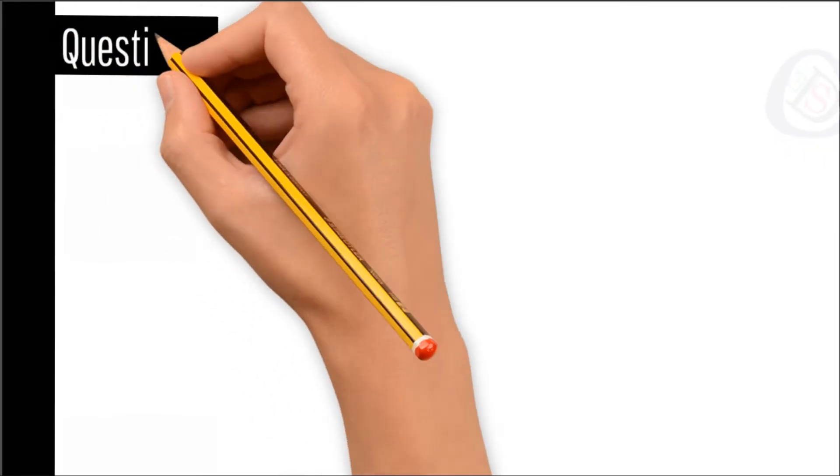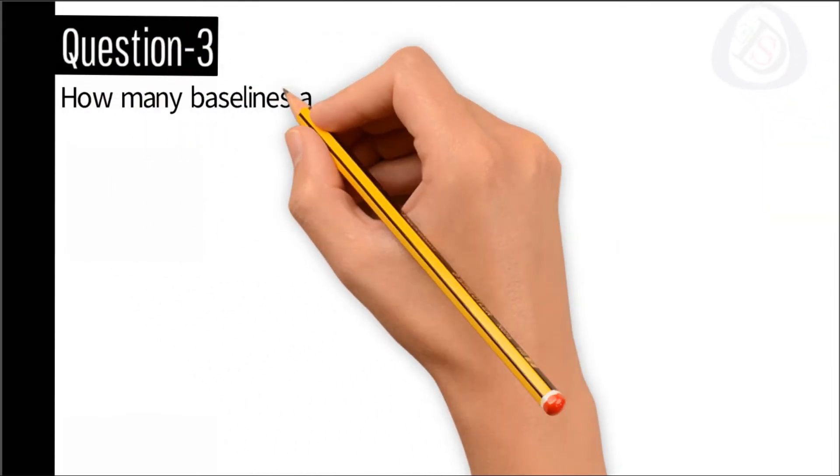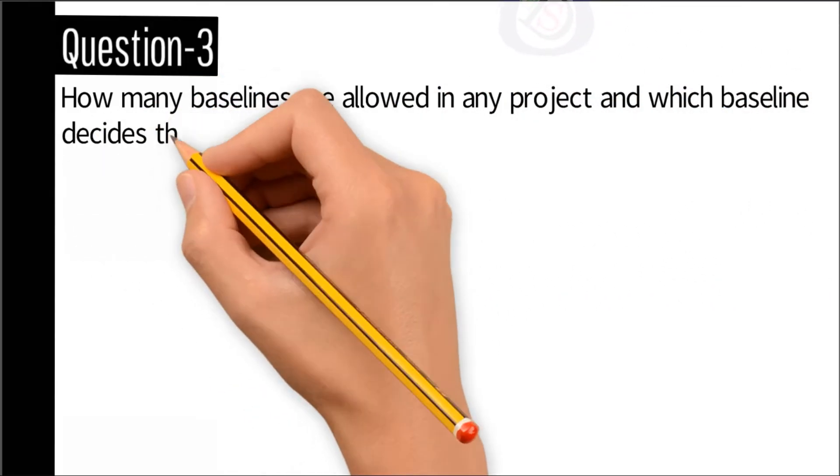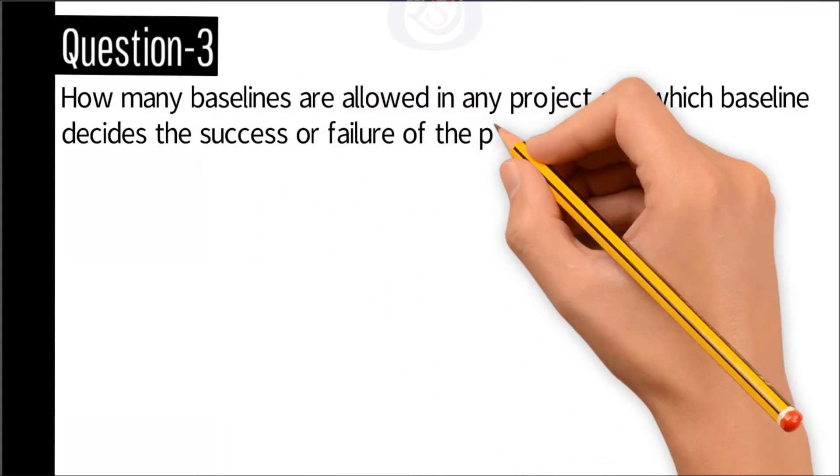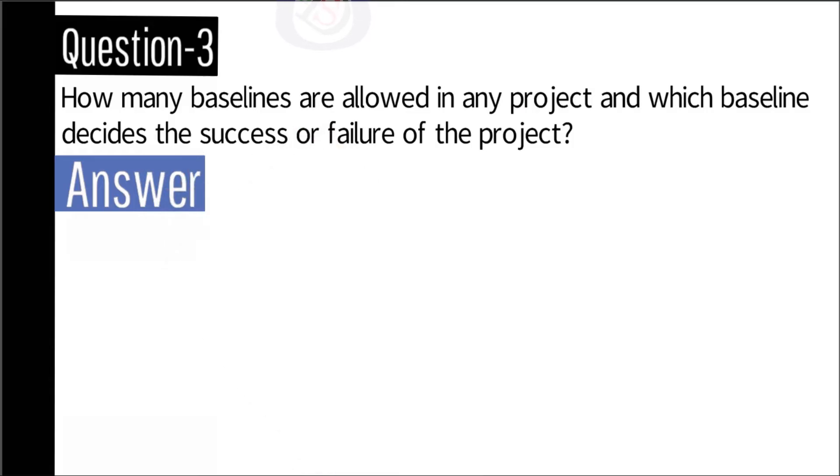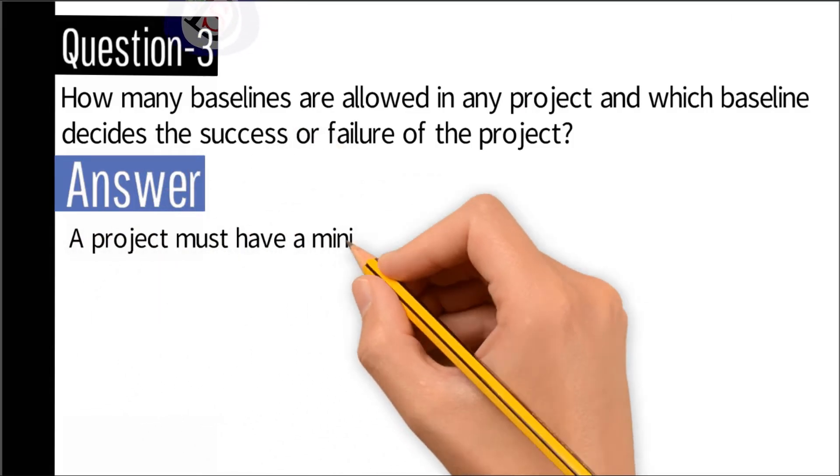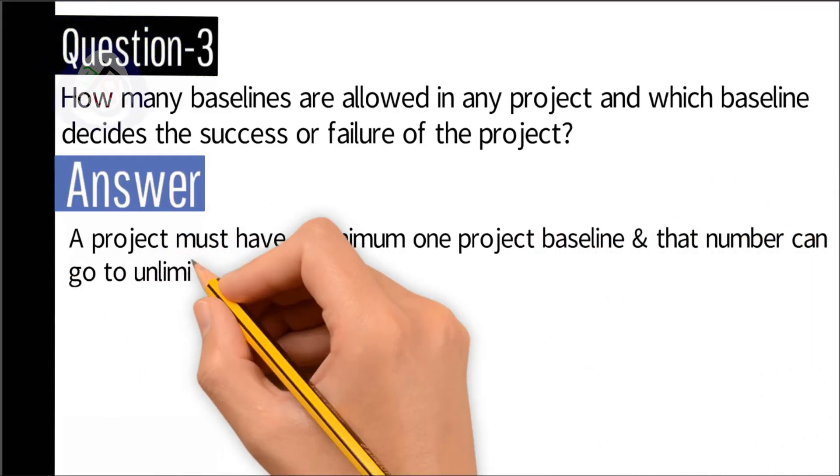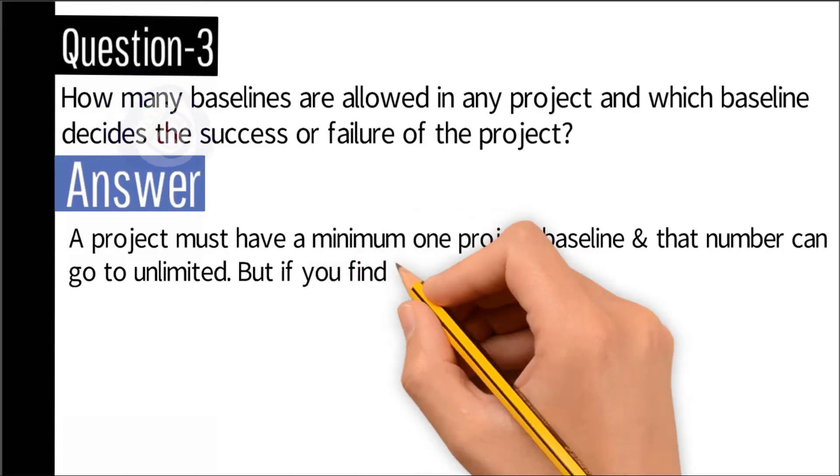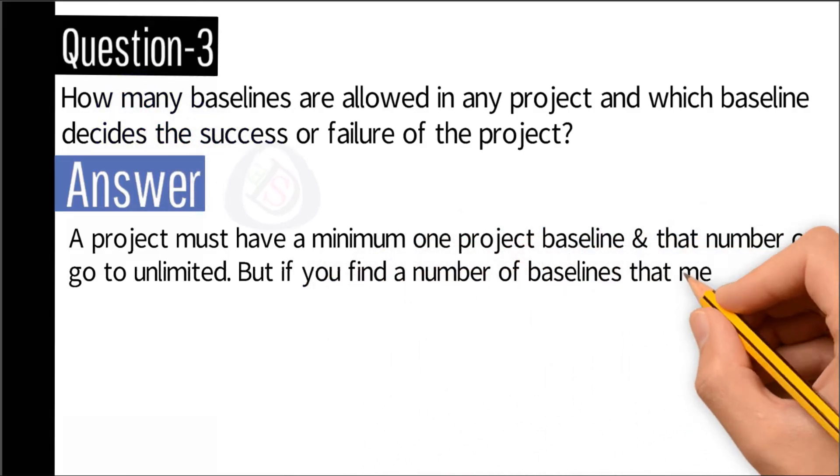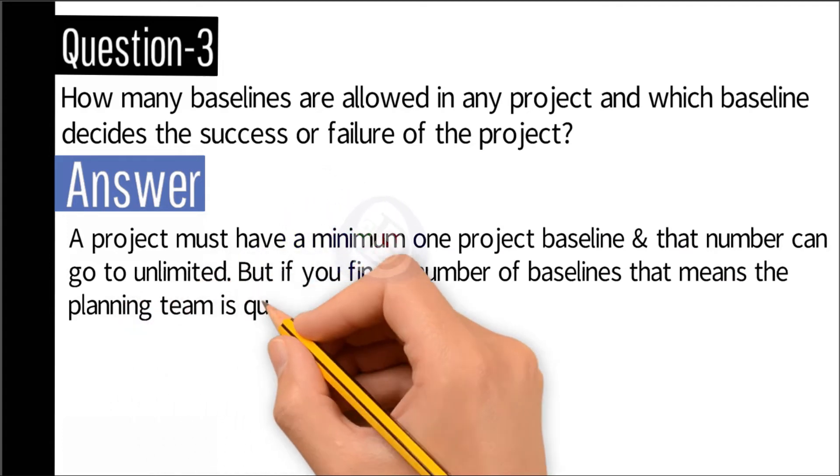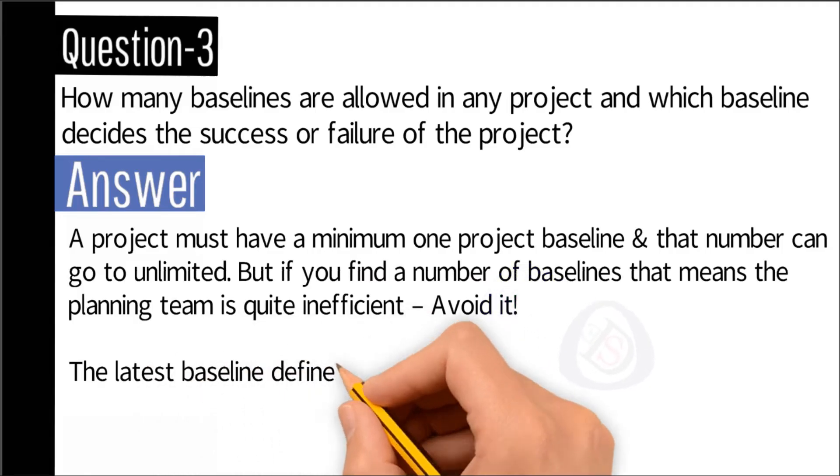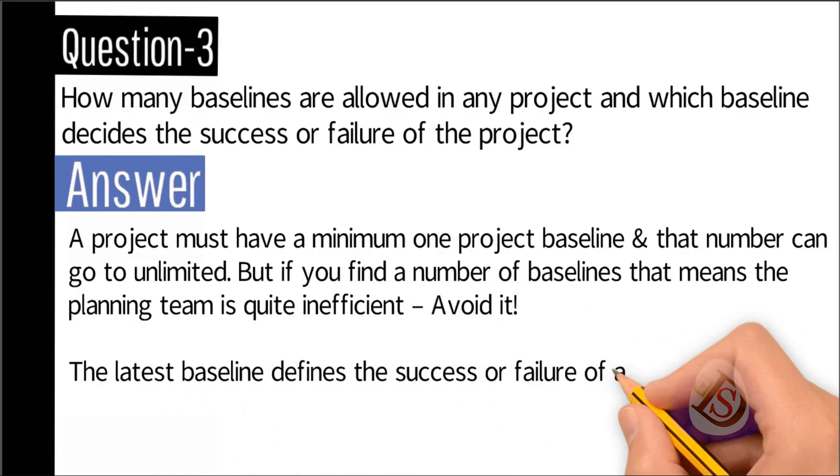Question number three: How many baselines are allowed in any project and which baseline decides the success or failure of the project? Answer: A project must have a minimum of one project baseline and that number can go to unlimited, but if you find a number of baselines, that means the planning team is quite inefficient. Avoid it. The latest baseline defines the success or failure of any project.